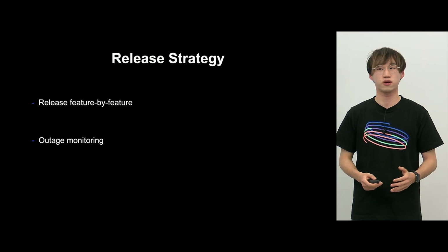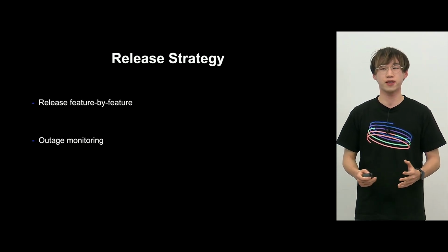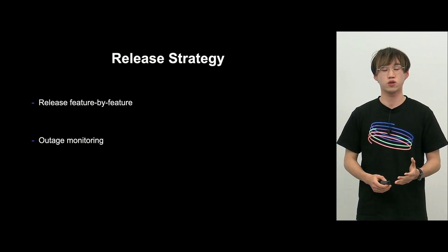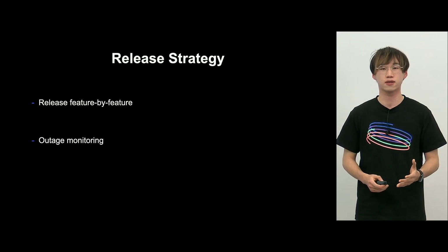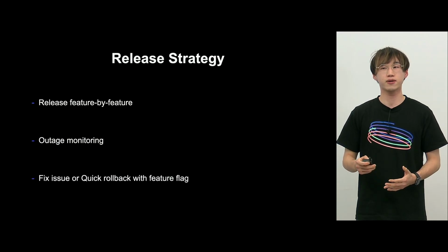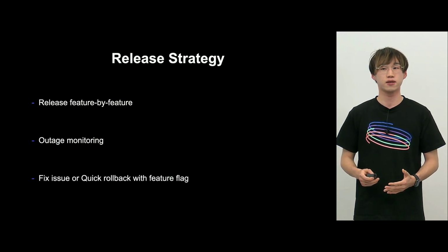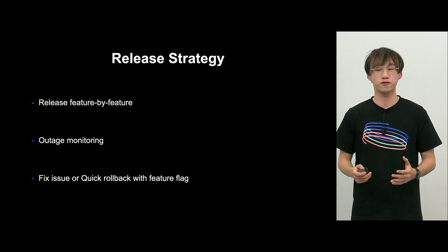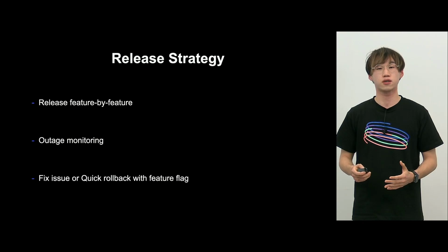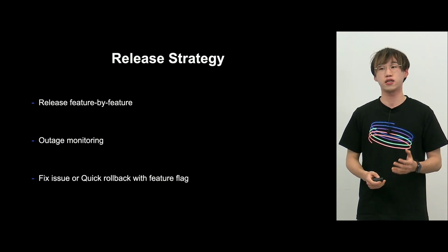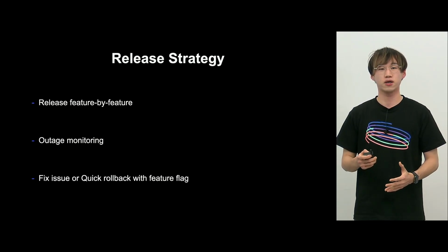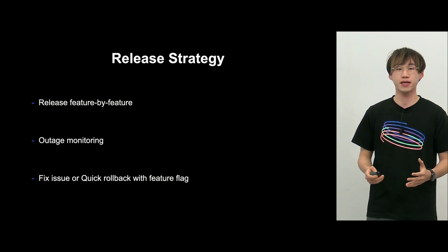Next is outage monitoring, which is not a special topic, but part of a very common development flow. However, when an outage occurs, it is important to know how to deal with it. If an outage is caused by migration, we will first determine the cause, fix it if it can be easily fixed, and release a hotfix. If we determine that there is a fundamental problem that will take some time, we can turn off the feature flag and release a hotfix that reverts to Anko layout.